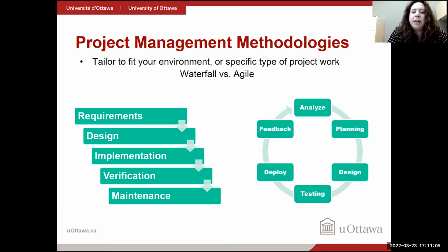And it's nice to have all your key stakeholders involved at the beginning, and you can plot out all those requirements, and then they can be a little bit more hands-off as the actual work starts to take place. It's a great method to use when your project requirements are fully understood up front, and your project is consistent and predictable. If there's any change expected or a volatile environment, it gets a little riskier because there's tighter change control elements you have to go through.